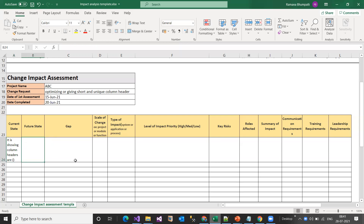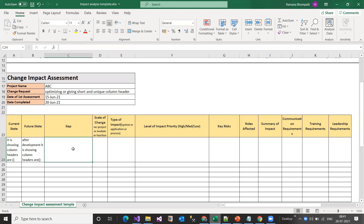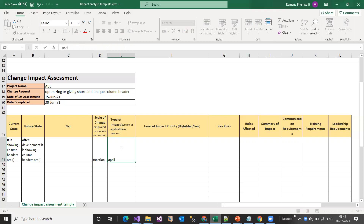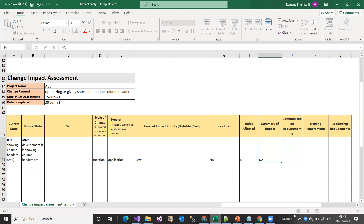When it is going to be completed — let's say June 2021. Here you mention the current state: what column headers are currently showing. Then the future state: after development, how the column headers will appear in a different way. The gap between current and future state is mentioned, and the scale of change is simply 'function.' The type of impact is obviously 'application,' and this is not going to impact anything significantly, so I'm mentioning the level as 'low' and key risks as 'not applicable,' roles affected as 'not applicable.' Communication to stakeholders is also noted.